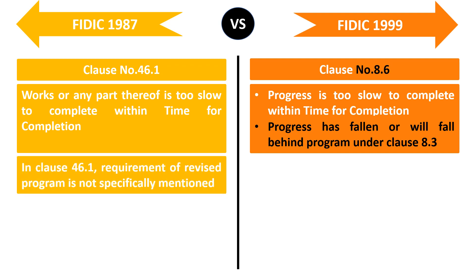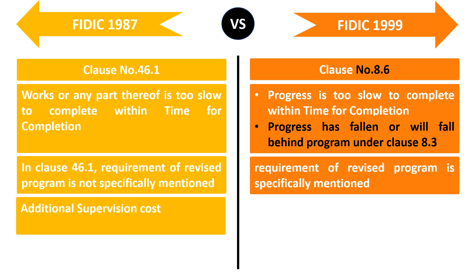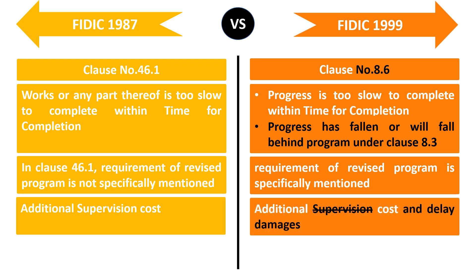In subclause 46.1, a revised program is not required. However, in subclause 8.6, a revised program is required. In subclause 46.1, the phrase 'additional supervision cost' has been used. However, in subclause 8.6, the terms 'additional cost' and 'delay damages' are used — the word 'supervision' has been deleted and 'delay damages' has been added.